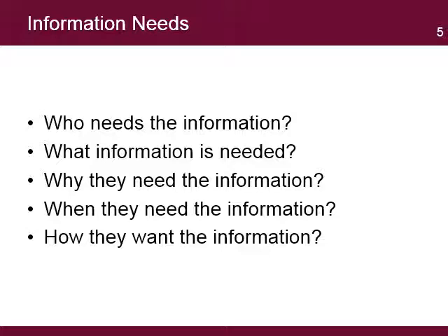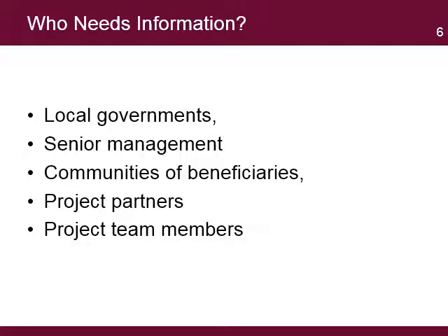The information needs can be classified by answering the following questions. Who needs information? What information is needed? Why they need information? When they need information? And how they want information. The first step is to identify all the project stakeholders who need information.